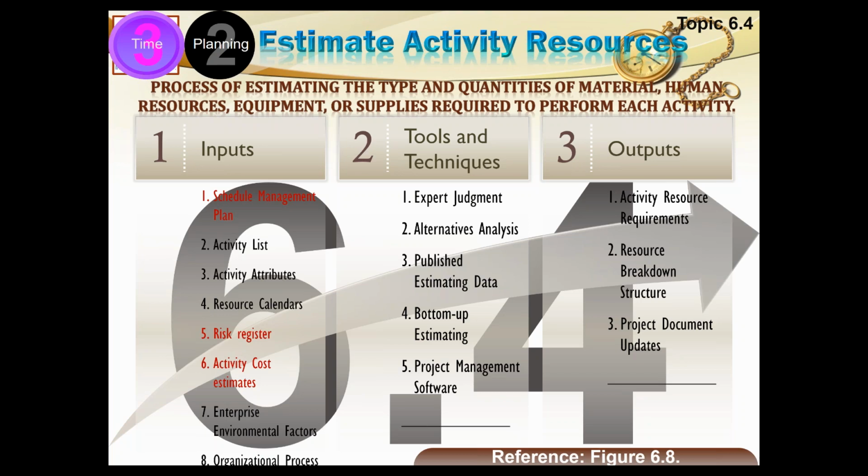Then under human resources, I can have the carpenters and masons and this and that. And under the masons, we can have the expert masons, the novice masons, the intermediate type masons, and then in novice, we further can have the names of the people who are there. So it is kind of a complete inventory of all the resources, which could be drawn in shape of a breakdown structure. So this is resource breakdown structure, and once we have identified all the resources, we could allocate them accordingly on our resource breakdown structure, and ultimately the project documents could also be updated.